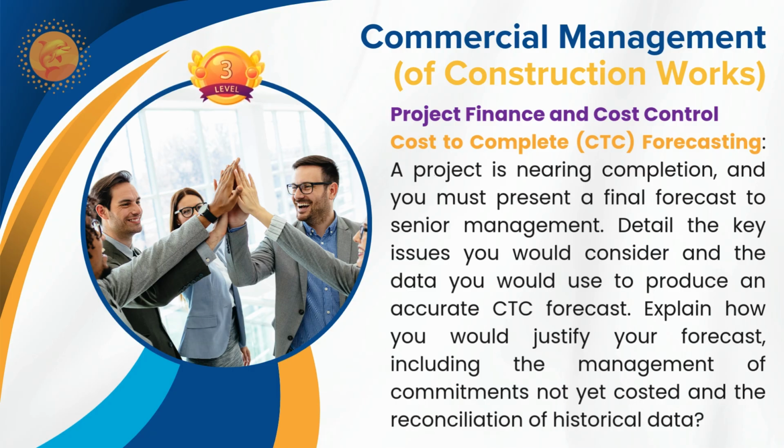That is also the adjustment you will make, and what are all the changes that have been accepted or instructed, how much commercial conclusions have been done according to those changes. If there are certain things that you committed and still you did not get agreed for the cost of the same, then how you are going to have some allowances for those works or changes or variations.